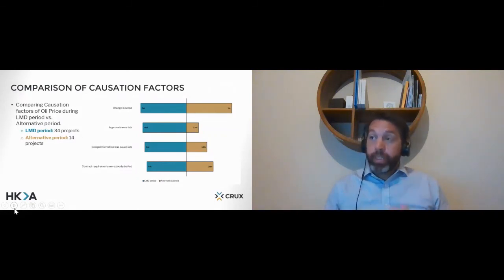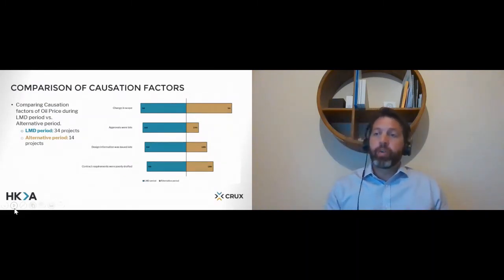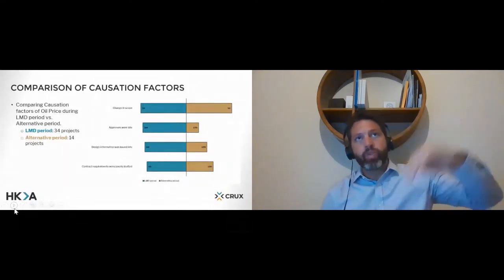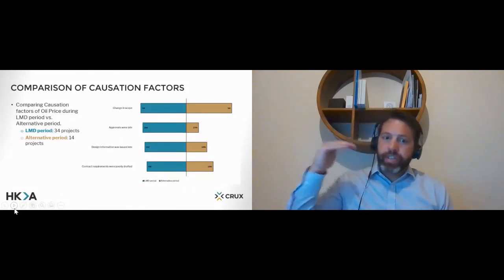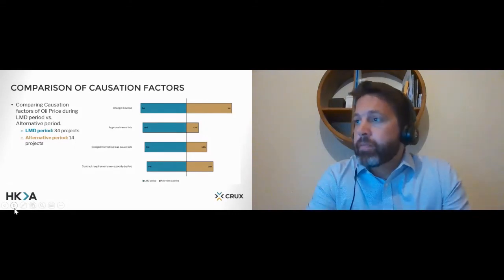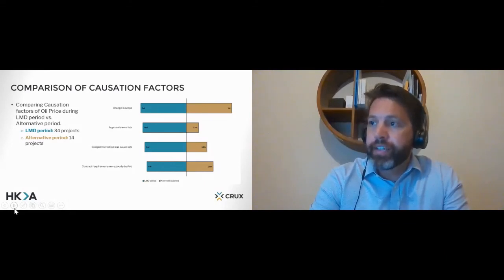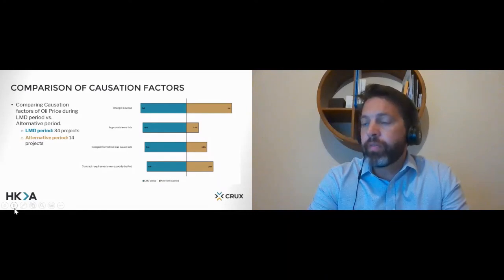Then we said, okay, when the oil price drops like that, what were the types of causations that came out of that period? So what we're trying to do is use the data to say, in a low oil price period, how does that affect the causation of disputes? And you can see up on the screen the four things that came up. Number 1 was change in scope. 2 was approvals were late and design information was issued late. And the last one is contract requirements were poorly drafted.